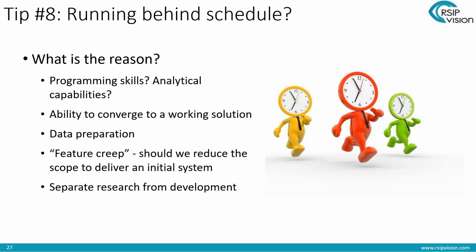And of course, separate research from development. If you have a bigger team, obviously you can parallelize it. You can have some people who are closer to the deliveries themselves, closer to the software, closer to the validation aspects, and they make fewer changes. And you've got other people and other code branches doing a more research-oriented track in order to reduce the risk and still devote effort to the deeper solutions for the long term of the task.